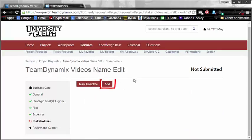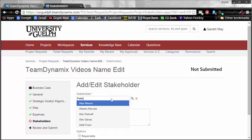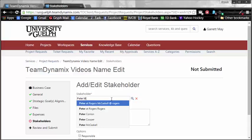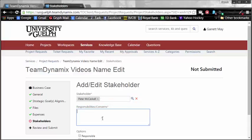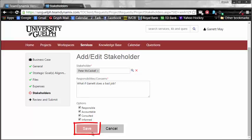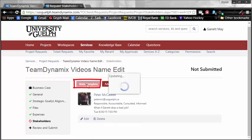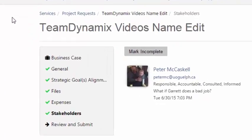Finally, the last one is the stakeholders, and I am going to need to add a stakeholder. And a stakeholder, we'll say Peter is going to be one of my stakeholders. Let's see if it comes out here. There he is right there. Responsibles, concerns, what if Garrett does a bad job? I don't think I will. Would I be responsible, accountable, consulted, and informed? Well, I think so. Let's select all of those and hit save. Additionally, add as many people as you wish, and then when you are done, hit that mark complete button.